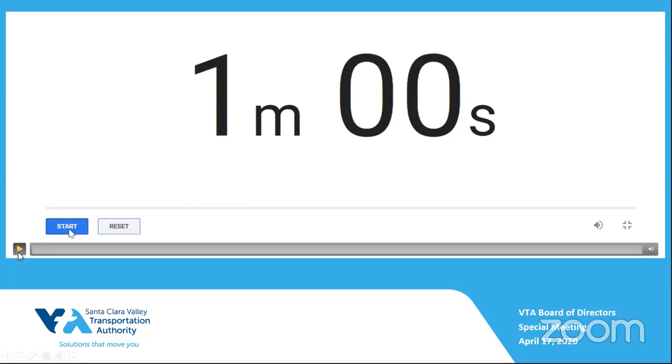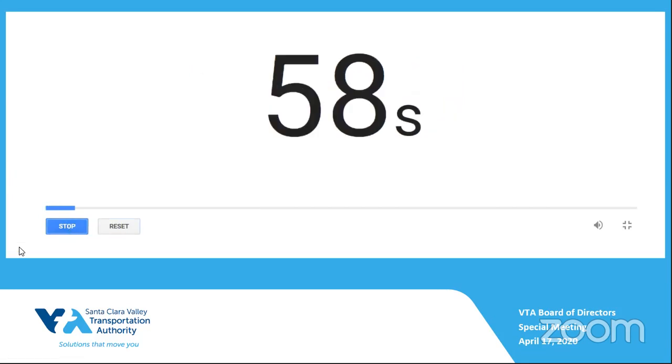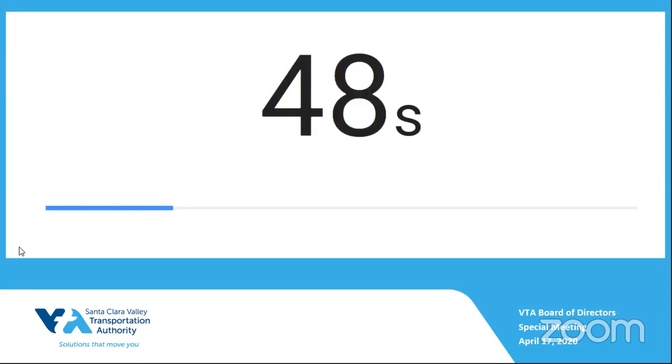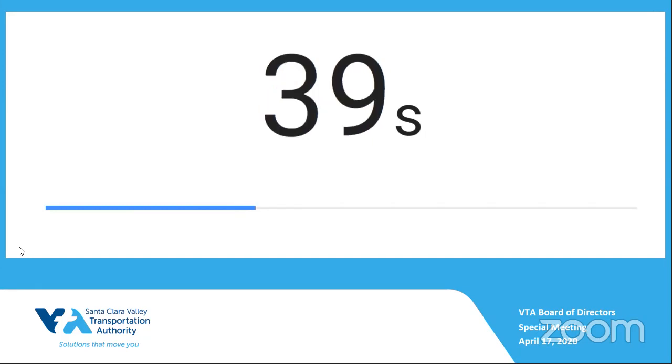Good morning. I would like to point out that Santa Clara Street is really wide and probably is more suitable for a cut and cover approach using something like the Milan tunneling method than a deep bore tunnel. This not only would be less expensive, but it would provide much better station access. What we're talking about with this deep tunnel is people having to go.